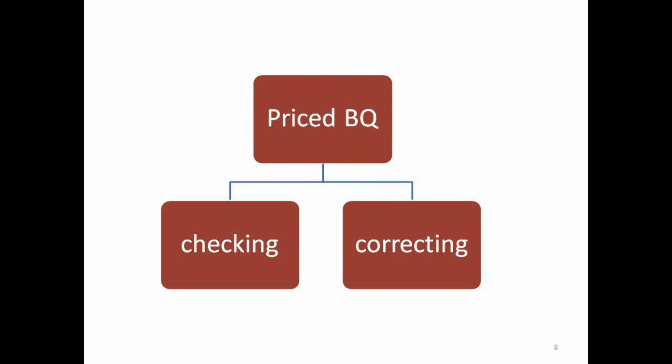When the bills come back at tender, it's an important task to actually review the tenders. Usually the lowest tenderer is the one which is anticipated to be accepted. The bill itself needs to be checked in the sense that, do the rates look relatively correct? Are there imbalances, or is there loading, in the sense that some of those earlier trades might be dearer than what they should be? So earlier trades such as earthworks may be a little bit more expensive than market rates than what it would be in later trades like finishing trades.